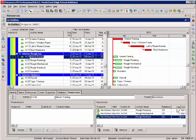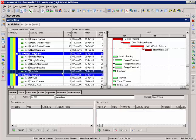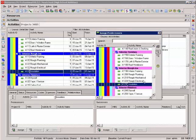The issue that you want to make sure you address in dealing with start to start relationships is making sure that you have a finish relationship for each of these activities as well. Otherwise there could be an indefinite finish restriction. So in this case I'm going to add all four of these, my framing, plumbing, mechanical and electrical, mechanical to my insulation as predecessors.